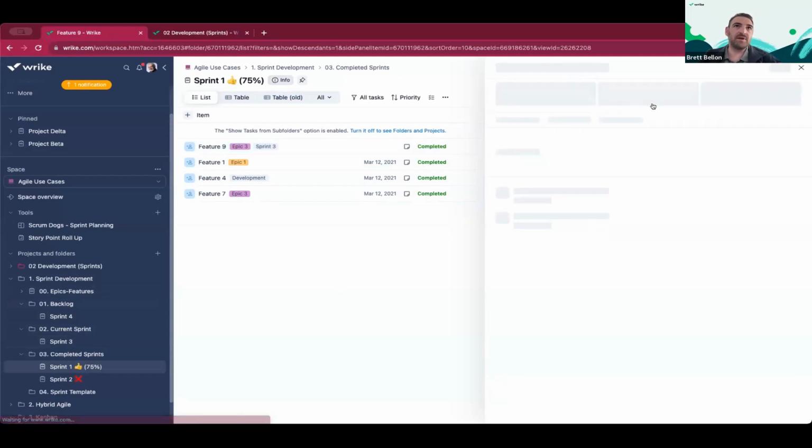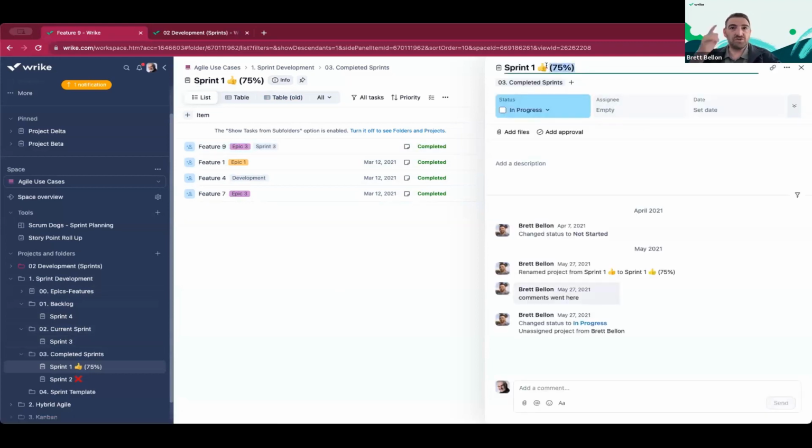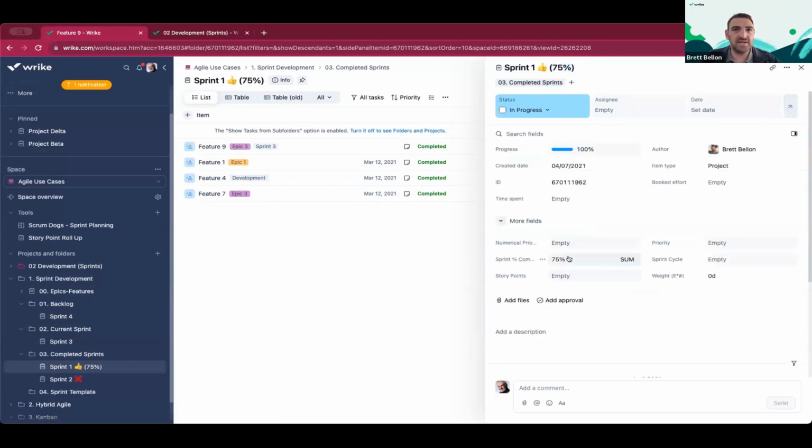And going back to a moment ago, the 75% was what we tracked as completed at the initial ending sprint review and sprint retrospective of sprint 1, which we wanted to store here, or sometimes in a custom field down here. That way we can still see for reviews of sprints in the future where we ended up, even after feature 9 has been marked complete a couple sprints down the road. So this one is a little bit more confusing in advance, but it is necessary. And I want you to know there are a few options there. We'll talk more about that in our next session.